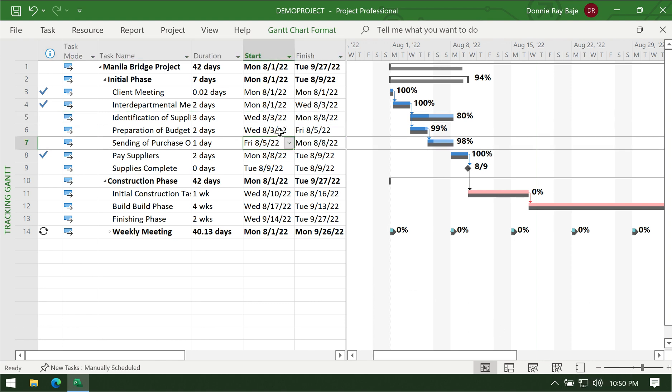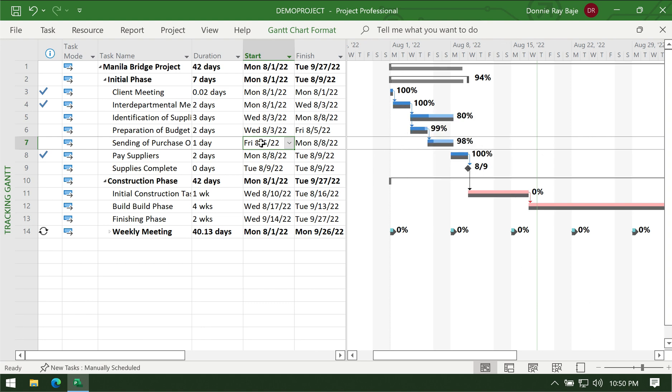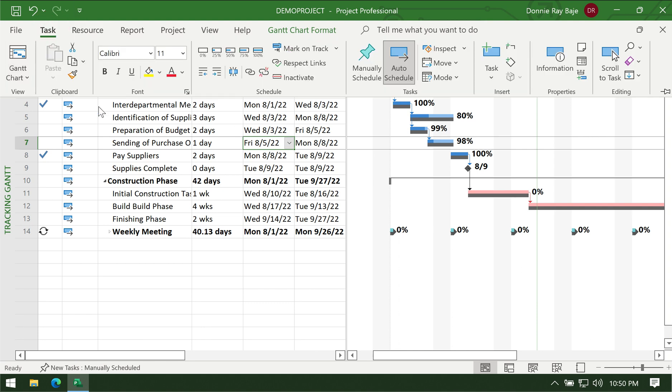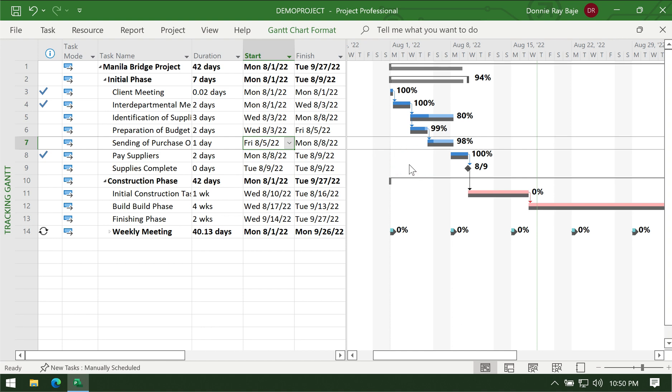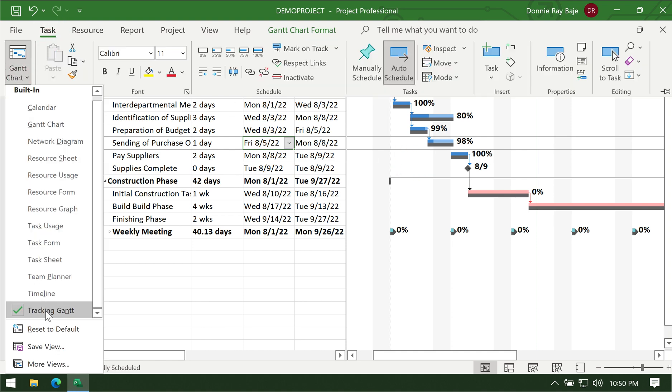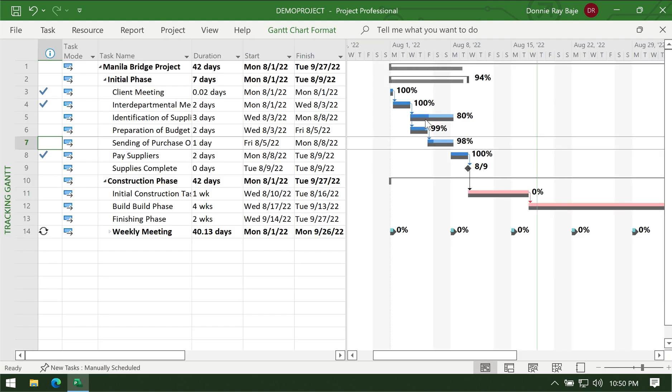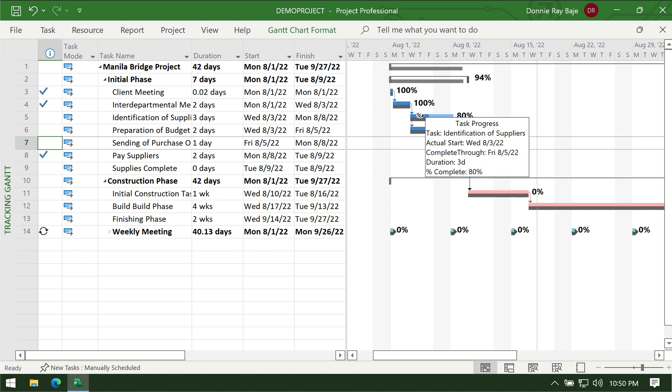By the way, it may help to mention that I'm actually not in the default Gantt chart. If you're going to follow my steps and you realize that the way that my Gantt chart looks like is not the same as the default, the reason for that is changing your project's progress is best done in the Tracking Gantt chart. You have to go to Task, drop down the leftmost View button, and change your view to a Tracking Gantt.